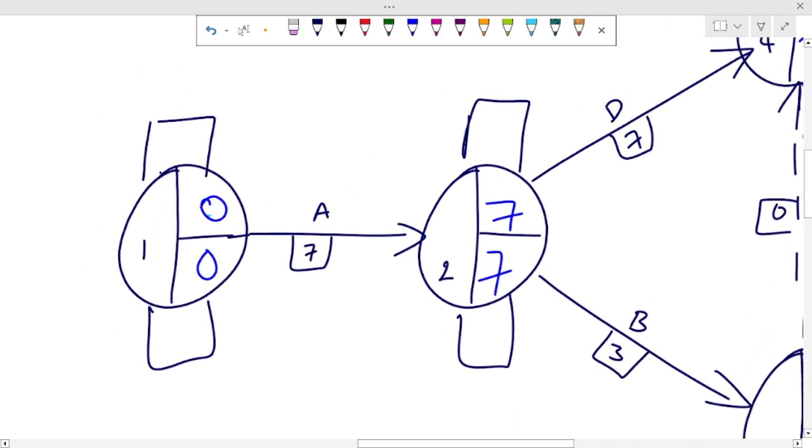So let's go. Of course, before getting to this point, there is no activity before this node, so here will be 0. Now, how about this point? To get this point, you consider the earliest finish time of the previous node plus the duration of this activity to give you the early finish time of the next node. Meaning this plus this will give you this. Are we together?